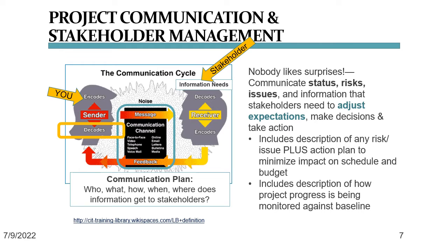Why is this important? Because as the project manager, it's your job to ensure that everyone understands exactly what you are communicating. This includes knowing how people like to communicate and what their favorite tools are, so that you can easily plan how to communicate the most important project information to them. You're seeing here the 5 most important aspects that your communication plan needs to address: the who, what, how, when, and where of your project communication.